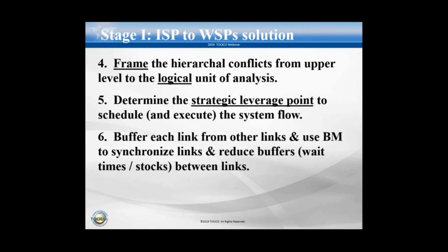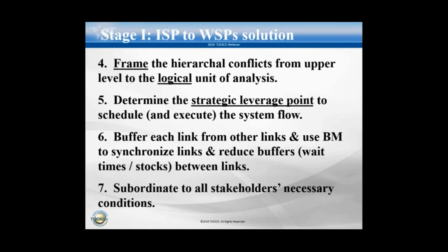That's what the buffers are. They're the wait times between the links, and to synchronize the flow of patients across the links. Then last, you want to subordinate to all of the stakeholders' necessary conditions, the rules and regulations that they place upon you.